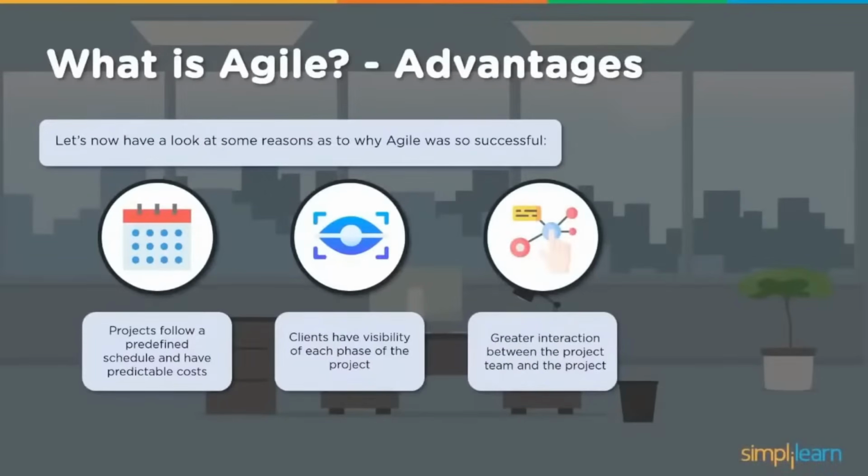So Scrum in specific has something called daily Scrum, a 15 minute meeting where the entire Scrum team should come in, sit together, self-organizing team as well as all that Agile team has to come together, express what they have completed before the last daily Scrum meeting and what is pending, why is it pending, and what they are going to do before the next meeting. So all these are expressed. This will give the team as well as the Scrum Master as well as the product owner visibility into what is complete, what needs to be completed, and this will help the project manager or Scrum Master to provide the necessary inputs, better visibility to the customers and stakeholders as well.